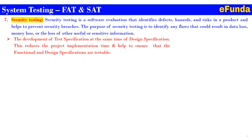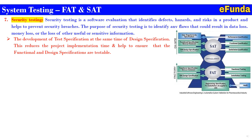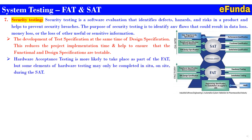The development of a testing specification at the same time as the design specification — one can refer to the picture where FAT and SAT details are given — reduces project implementation time and helps ensure that the functional and design specifications are testable. Hardware acceptance testing is more likely to take place as part of the FAT, but some elements of hardware testing may only be completed in-situ, that is on-site, during the SAT.